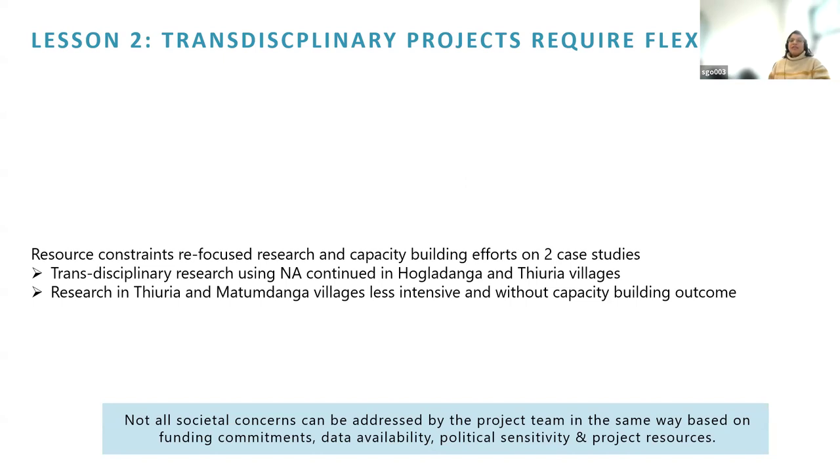The other issue was the resource constraints. We had four case studies, but early on we discovered that the amount of time and resources needed to do this entire research and capacity building in all four cases is really intensive. So we focused our efforts on two case studies instead of four. And so the transdisciplinary research was still done in all four case studies, but in a less intensive way in two of them. And similarly, two of the case studies did not have the same intensive capacity building efforts on the ground.